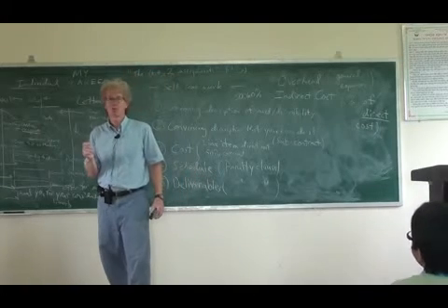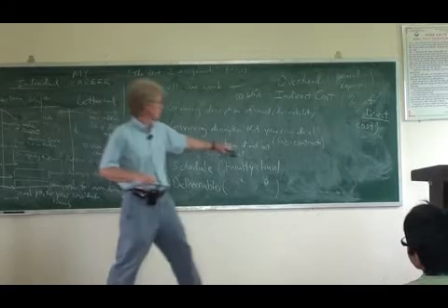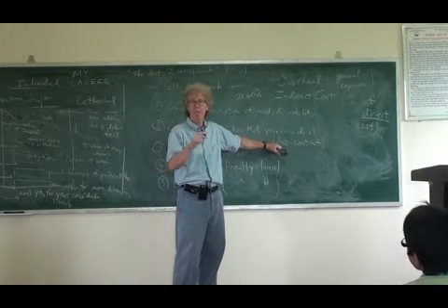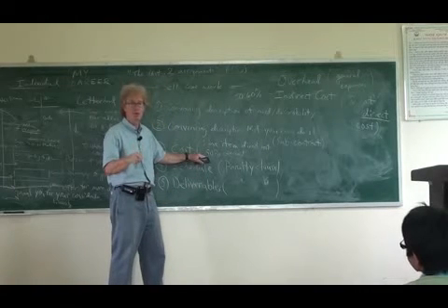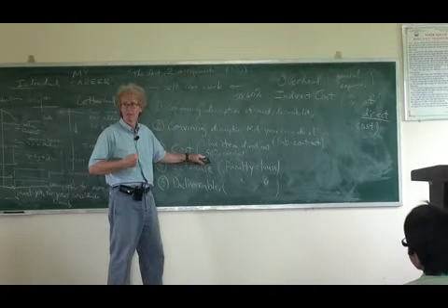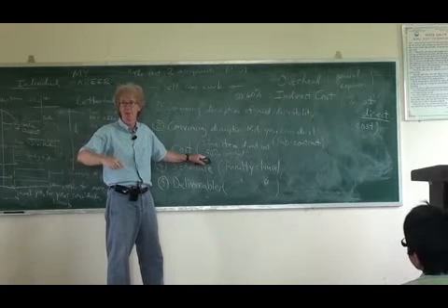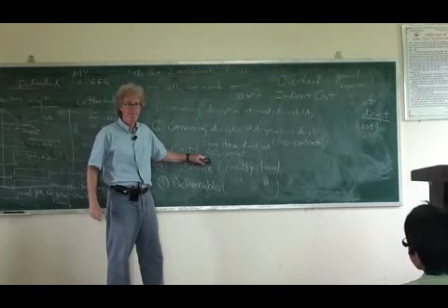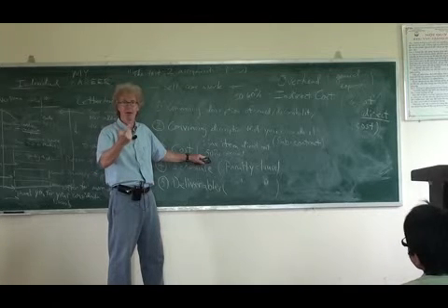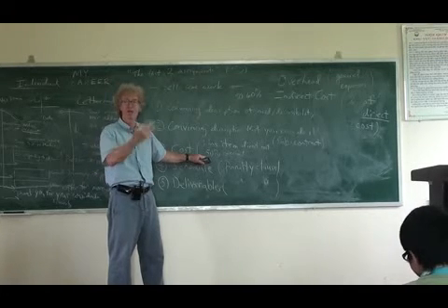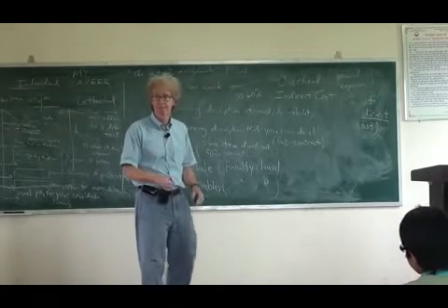Maybe those experts in Ho Chi Minh City are just like you. They're another company like this. You're going to subcontract them. So you're going to have to pay them to do the work for you. That's a line item in your contract with me. You need me to give you enough money so that you can pay them to do what they need to do for you. Okay? So I've already said 4 things. A salary, some kind of benefit like health insurance. I've said travel. I've said hiring other experts. What other kinds of direct costs might you have?